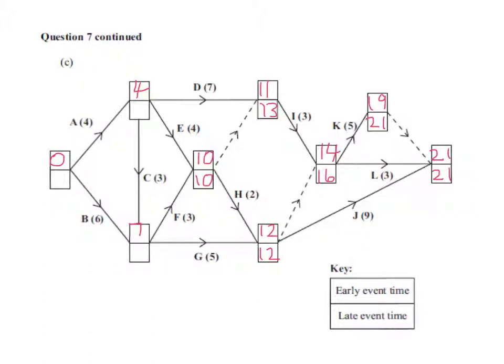At this point here we've got a 7 because 12 minus 5 is smaller than 10 minus 3. Here we've got 4 because 7 minus 3 is smaller than 10 minus 4 or 13 minus 7, and then as always we've got a 0 here.